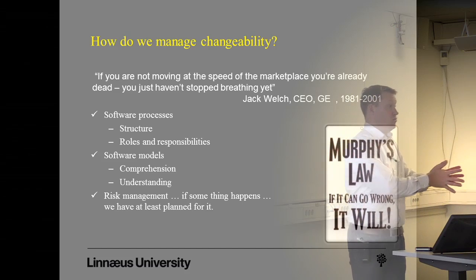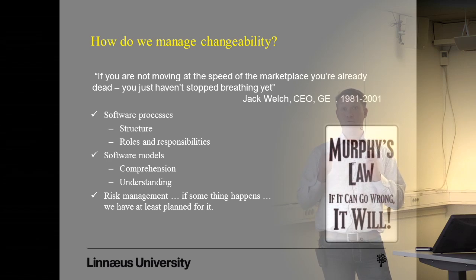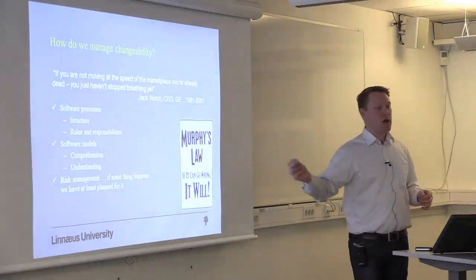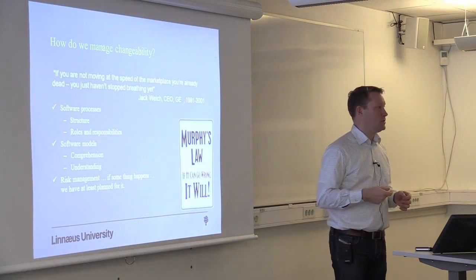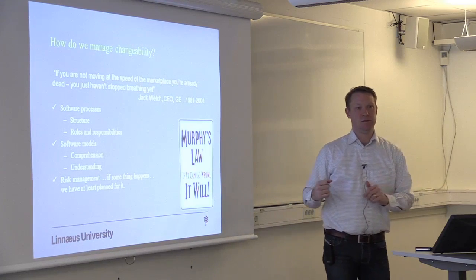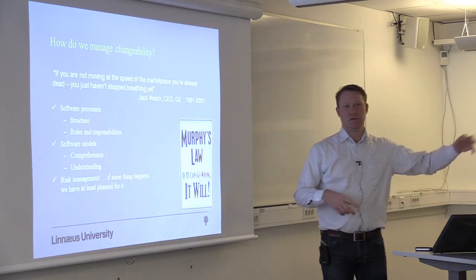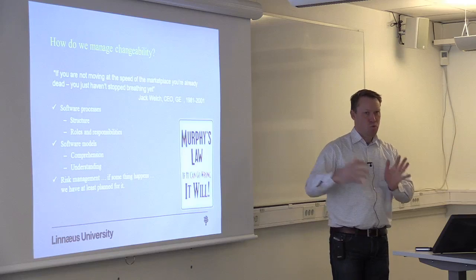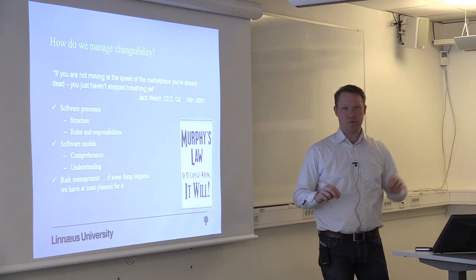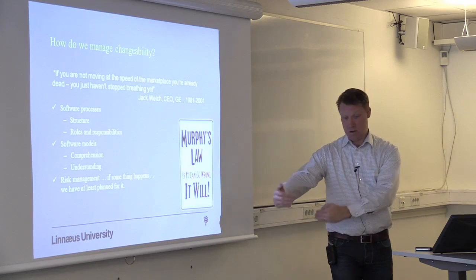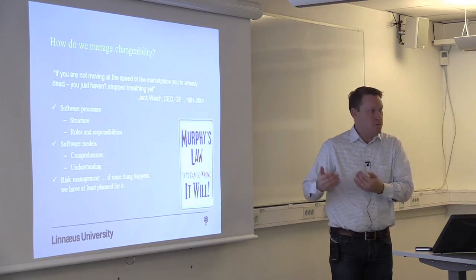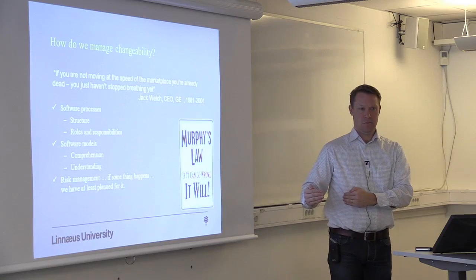Because there are some risks related to the project, and there are some risks related to the product. We all know that technology plays a big role in our projects. So we invest money in a database management system, or we purchase some consultancy service or whatever. But we do that under the assumption that our evaluation, you remember the engineering practices, our evaluation of the database management system or the consultancy service, was right. But what if they don't deliver?